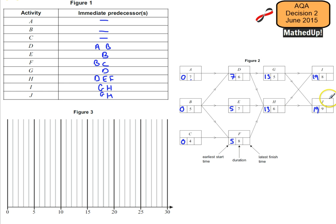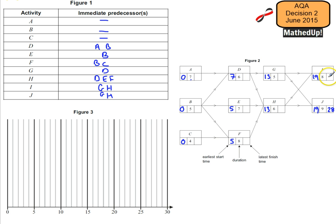We're now going to put in our latest finish time - the latest time that an activity can finish without delaying the project. J is going to finish: if it starts after 19 minutes, we add 9 to get 28 minutes. That's the latest time we can finish without delaying the project. And I, although 19 plus 8 is 27, it has the luxury of a float, because it can also finish after 28 minutes without delaying the project. So we put 28 in for both I and J.